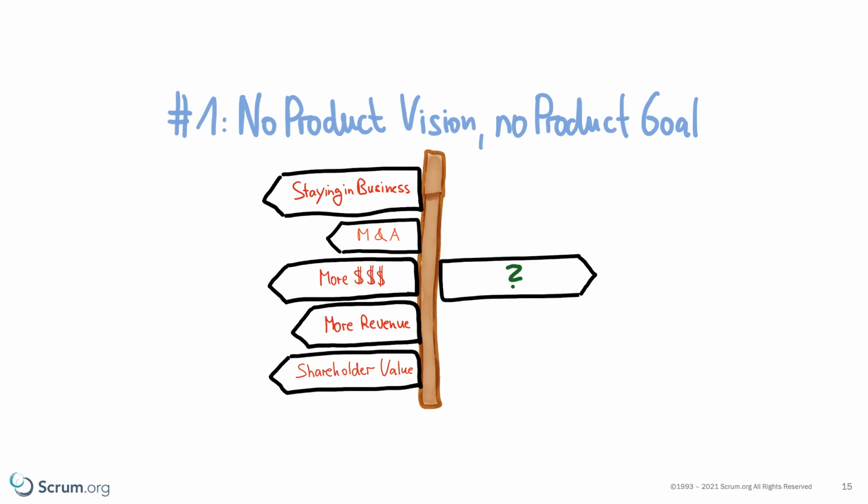Great, thanks, Stefan. So for outdated items or items that won't be included in the next, say, 3 or 4 sprints, how do you recommend that we track those so that they're not forgotten, but not clouding the product backlog at the same time? I mean, what you could have is a second board, for example, where you put them. Or, to continue the Jira metaphor, create another project where you park these kinds of tickets if you don't like to delete them because you're afraid you might need them in the future, but just get them out. Personally, I believe if you thought something would be important and then you didn't work on it for a long time, just delete it. If it's important, it will come back and then you recreate it.